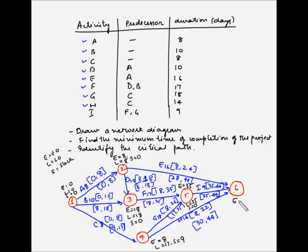For event 6, the earliest occurrence depends on activities E, I, and H. The earliest finish times are 24 for E, 44 for I, and 22 for H. So the earliest occurrence for node 6 is the largest, which is 44. The latest occurrence is also 44, and slack is 44 minus 44 = 0. We have now found the earliest and latest occurrence and slack for all events.